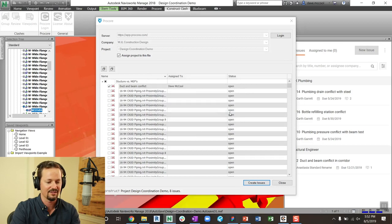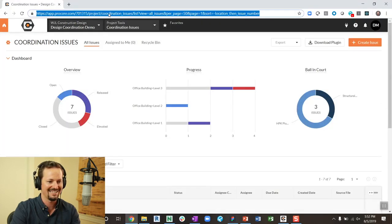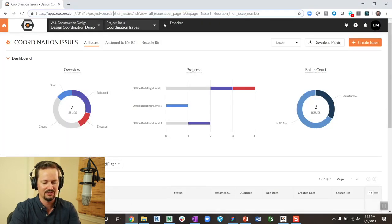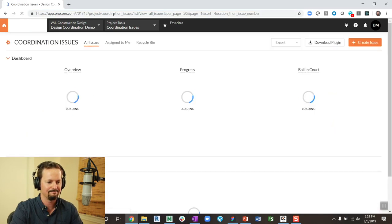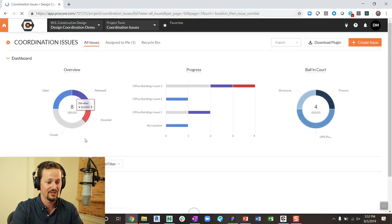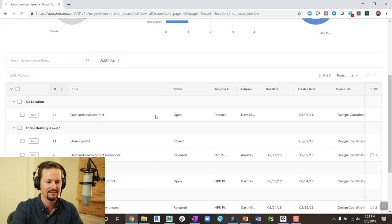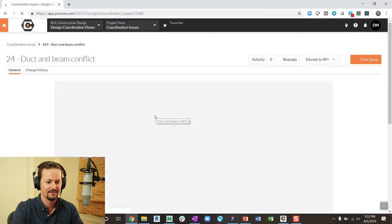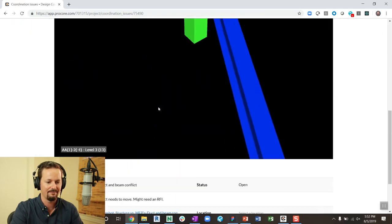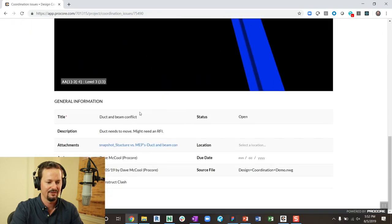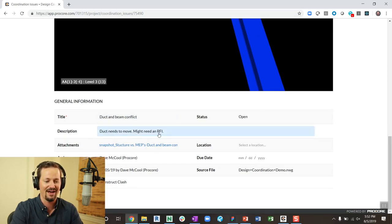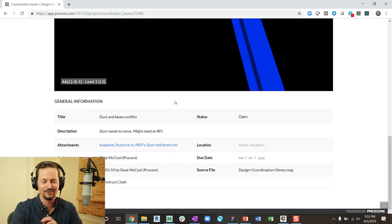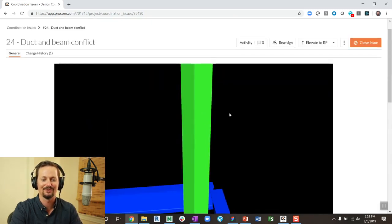And so let's take a look at what that looks like on the web. So I come over to the web, I had seven issues should have eight, which I do. If I come down and click on that duct and beam conflict. There's that screenshot. You see duct and beam conflict, you can see the description where I left that comment duct needs to move, might need an RFI, as well as the assignee direct integration pushes straight from the groups.